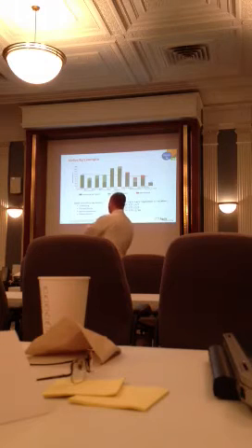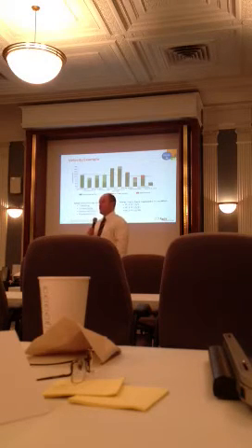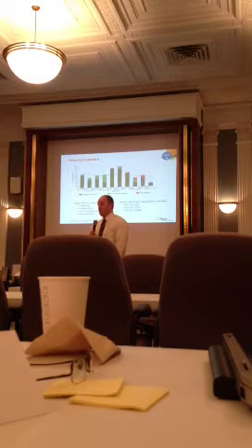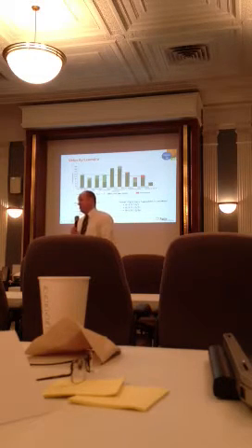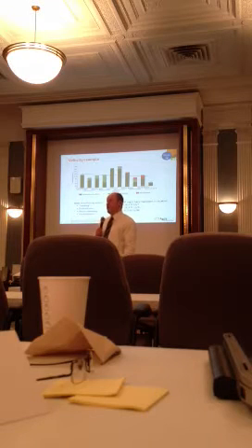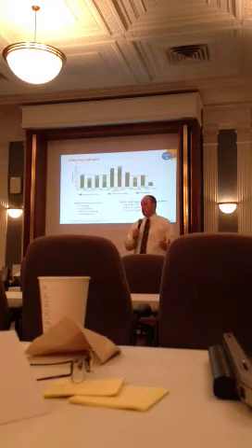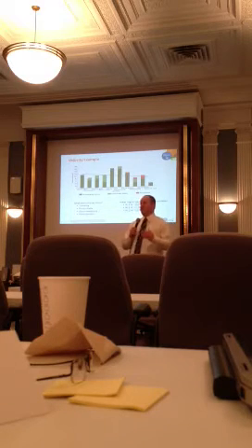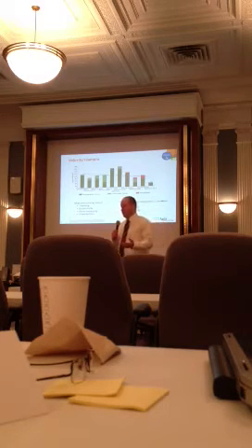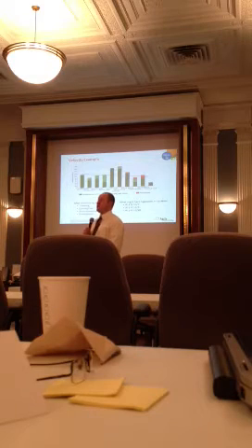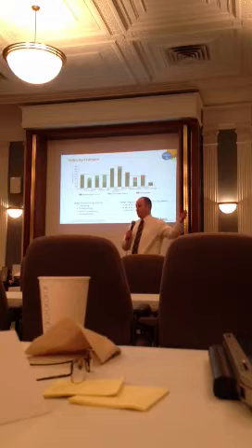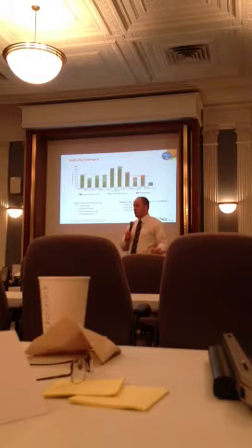No, this is saying I committed to 120, and we did not meet our commitment by roughly 10 story points, whether we're able to control it or not. It could be a bunch of different reasons, but the bottom line is I didn't get acceptance on 10 story points, which probably means that I'm still testing them or maybe even still developing them, but for some reason they didn't get acceptance. Probably not because the product owner just didn't want to accept them for whatever reason, because there's a good relationship there. If the work was done and should be accepted, they would have accepted it.